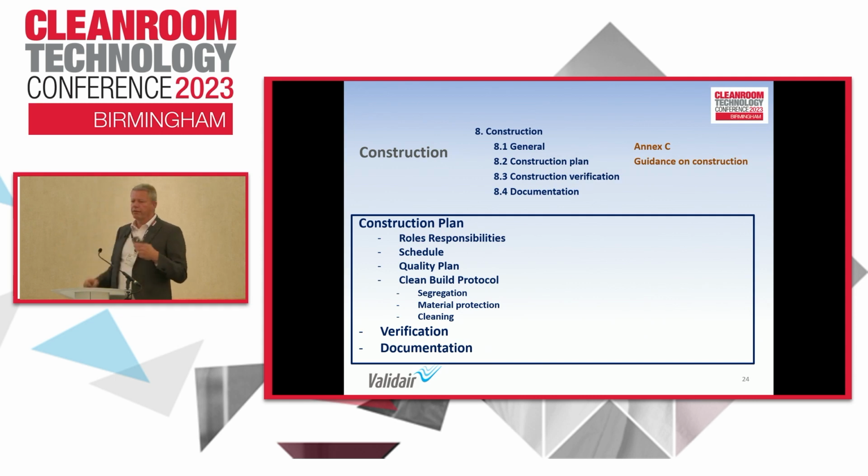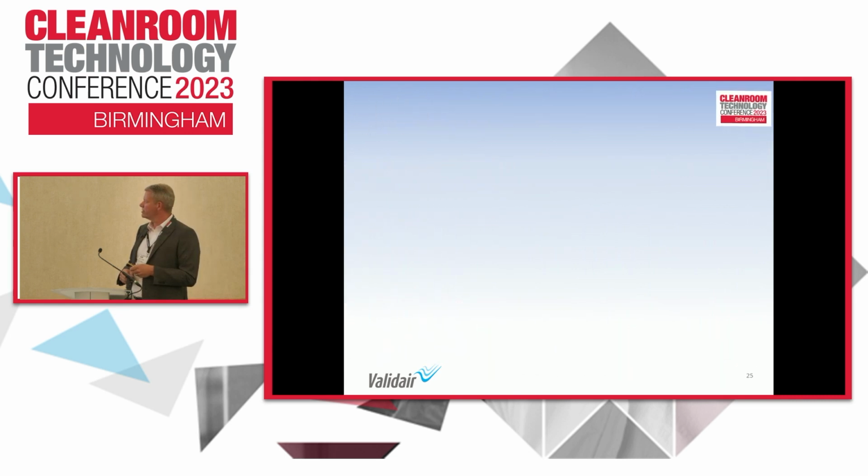The speech before talked about IQ and OQ and those kind of things. We don't use that terminology in here because it's all industries, so the word qualification gets scared away. So it uses verification. You have a construction verification period, which is a bit like your IQ, as people would know. And there's detail there that would happen. You document that.